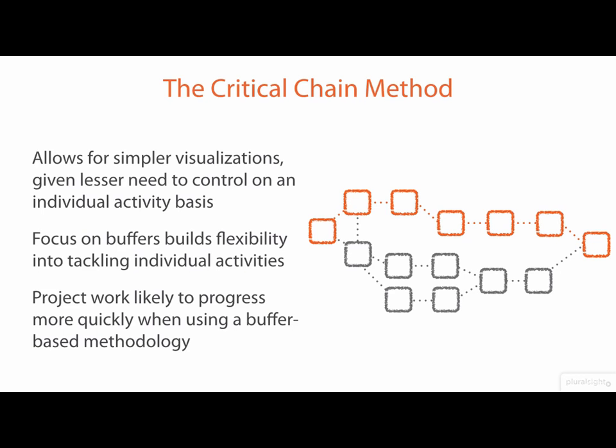With a critical chain system, on the other hand, all we're doing is picking our pocket in the future if we take too much time on an activity now. That buffer, as it dwindles down, means that we'll have less extra time, less extra comfort zone later on in the project. And so the impetus is always to complete project work as efficiently as possible, knowing that any draw onto that buffer will simply mean that we're going to have to try our best to make it up in the future.